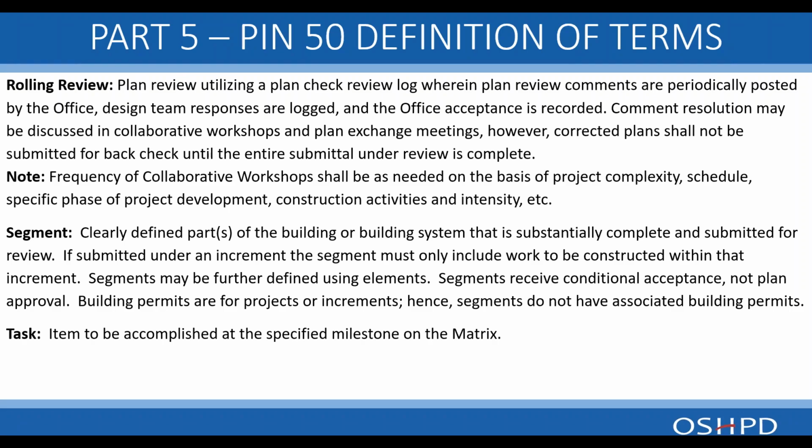So the benefit of a rolling review is the comments are posted weekly, and there are periodic collaborative workshops scheduled so that as the review progresses, the design team can come in and talk about proposed resolution to the comments.